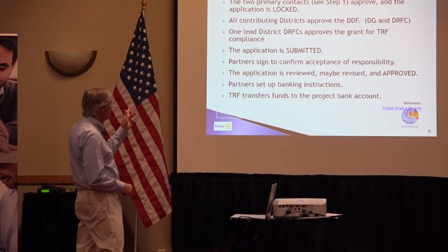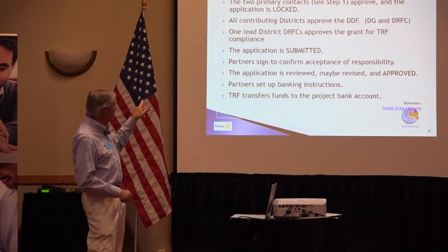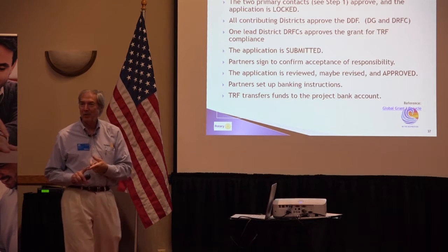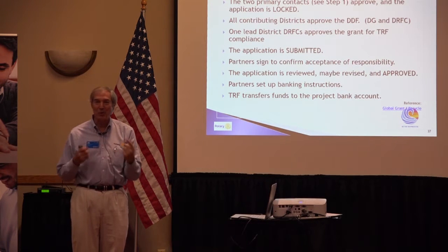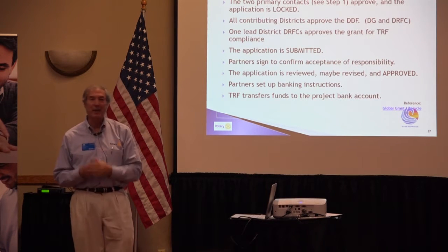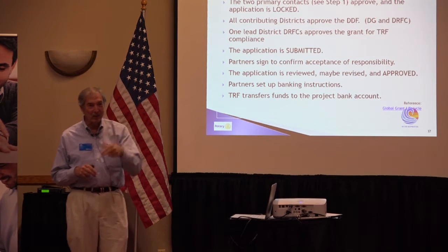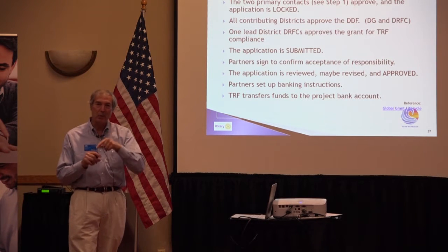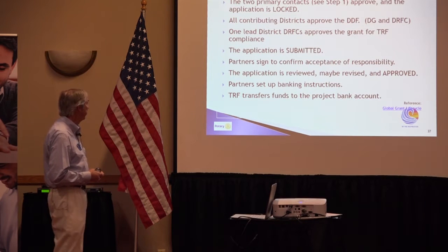Then it becomes submitted. When it's submitted, then the partners sign, this actually happens really right at the same time. The partners have to sign a little responsibility statement, and sometimes we get hung up on this. If the partners don't know they have to do that, then the thing just stops dead in the water again. They've got to sign a legal document that says we're jointly and severally responsible for this project.